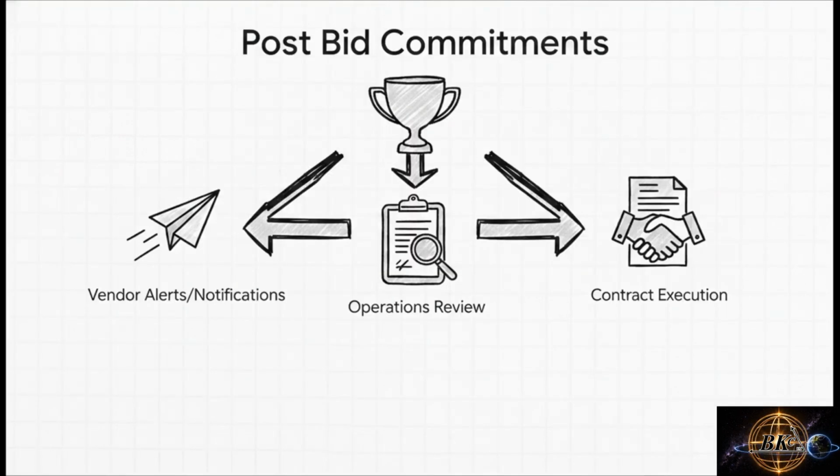Now, if you actually won the bid, congratulations. But the estimating manager's job pivots instantly to post-bid commitments. The second the award is pending, they are blasting out those vendor and sub-notifications. They are jumping straight into preliminary reviews about the schedule, the budget, and any anticipated roadblocks. They're aggressively reviewing the scope to get that final contract executed.